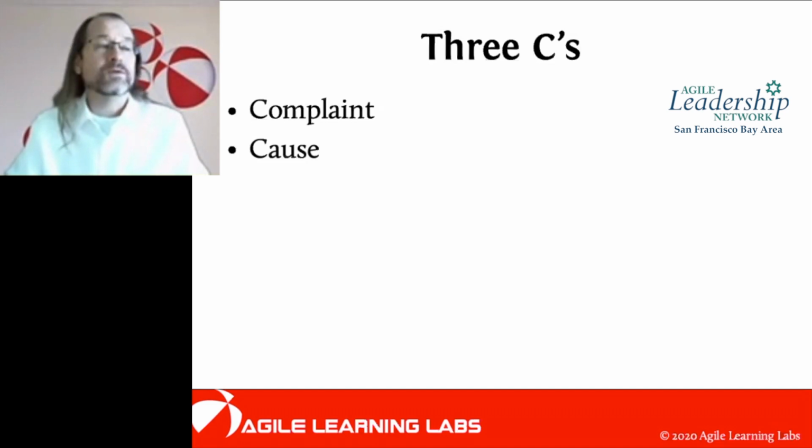A variety of ways of doing root cause analysis. One that I like very well is frequently called the 5 whys. And the way that one works is you basically state your problem, and then you ask, why is that so?